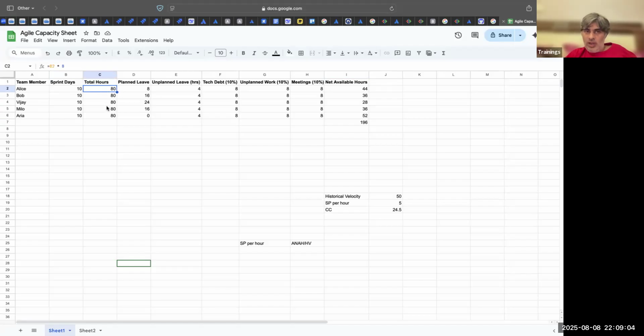80 hours is my total capacity. Then I am going to reduce from my total capacity the planned leaves. Let us say Arya says I'm not going to be available for 1 day. Bob says for 2 days. Milo is also not available for 2 days. Arya is available on all days.